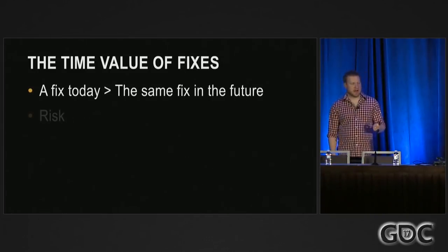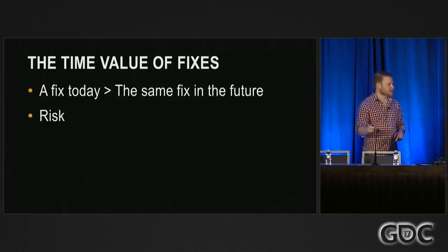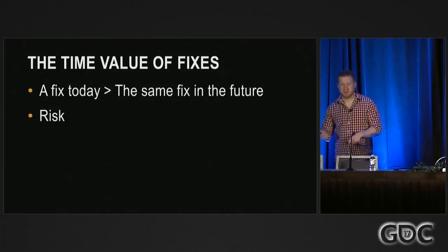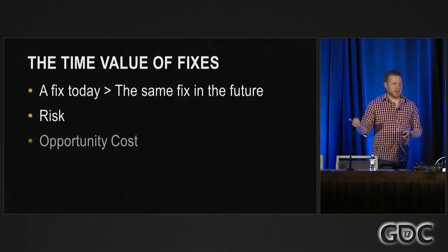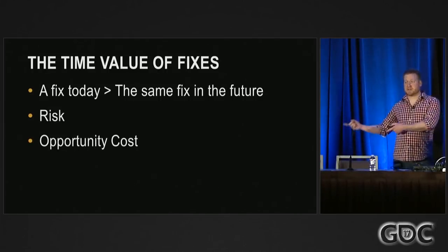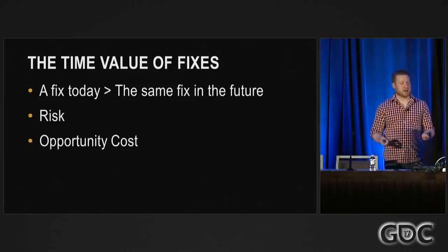I think we have a direct analog in software development that I like to call the time value of fixes. I think a fix today is more valuable than that same fix in the future for the same two reasons. Risk, because it might not be the same fix in the future. It might be a much larger fix in the future because it deals with other systems. And opportunity cost, because if it is a larger fix in the future and requires more time to resolve, that's time you could have spent somewhere else making your game better.